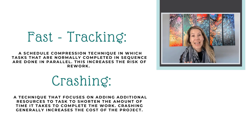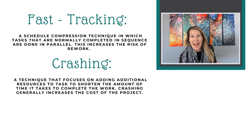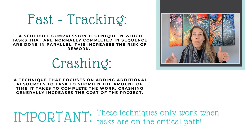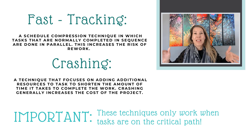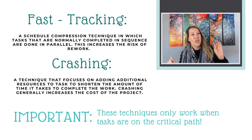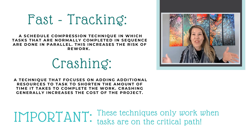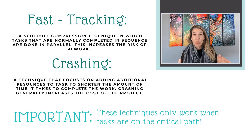Regardless of which of these techniques you're using, it's really important that you know your critical path. The critical path — there's a whole video on it if you haven't watched it — makes up the overall start date and end date of our project and shows the sequence of work to be done. If you start fast-tracking or crashing tasks that are not on the critical path, your project is not going to end any sooner than it's currently scheduled to. So we need to know our critical path to be really strategic about fast-tracking and crashing.